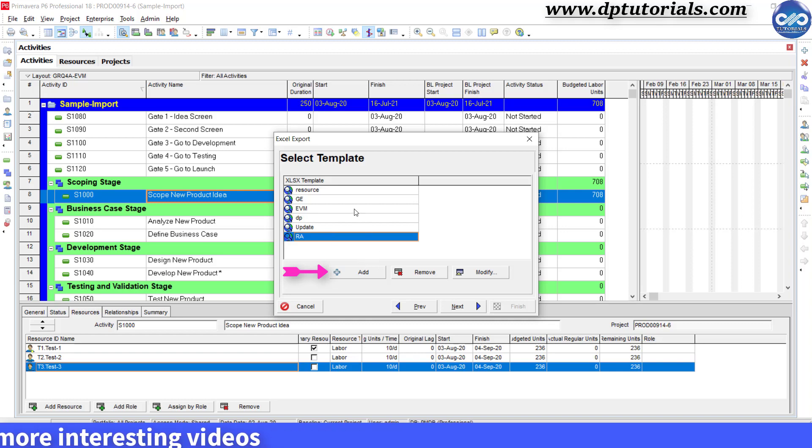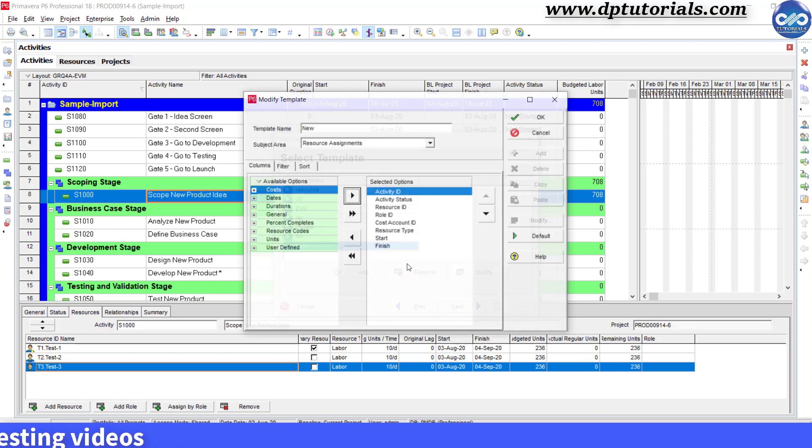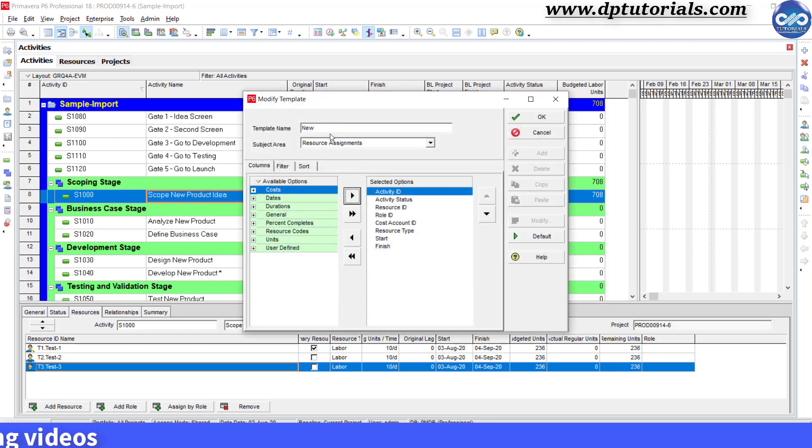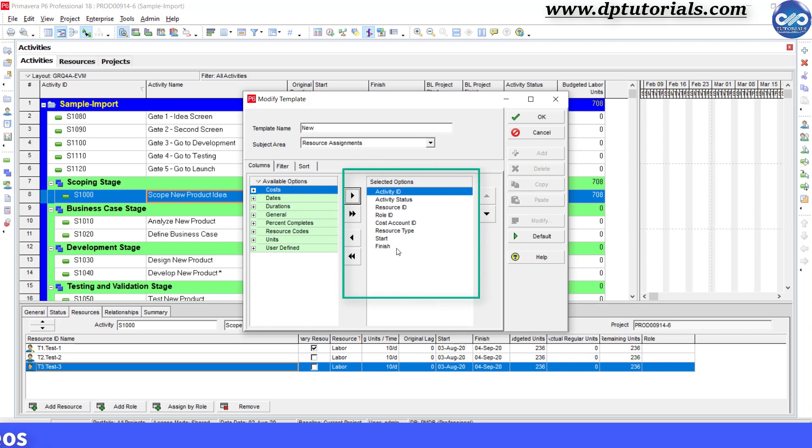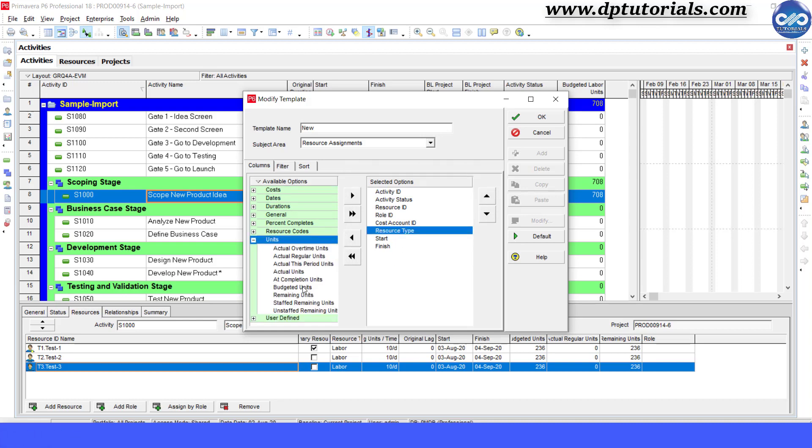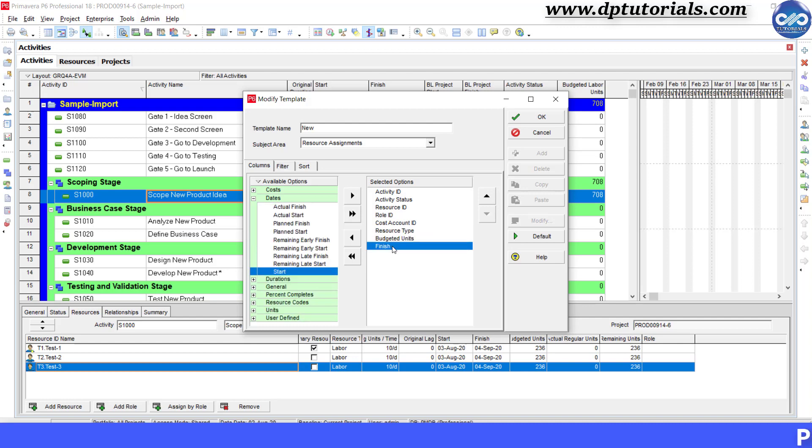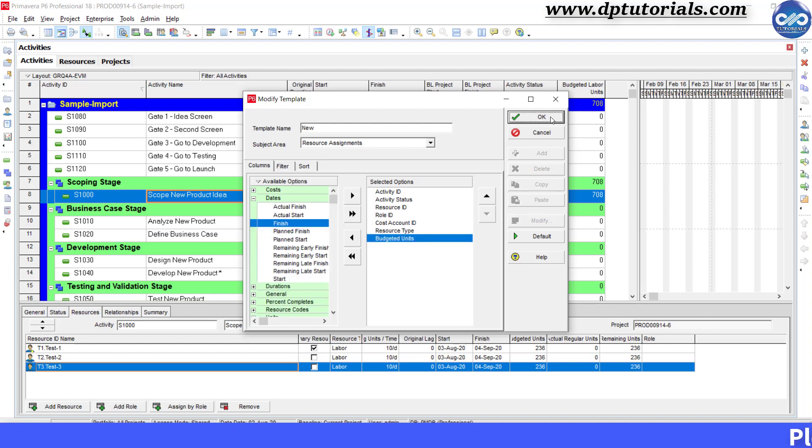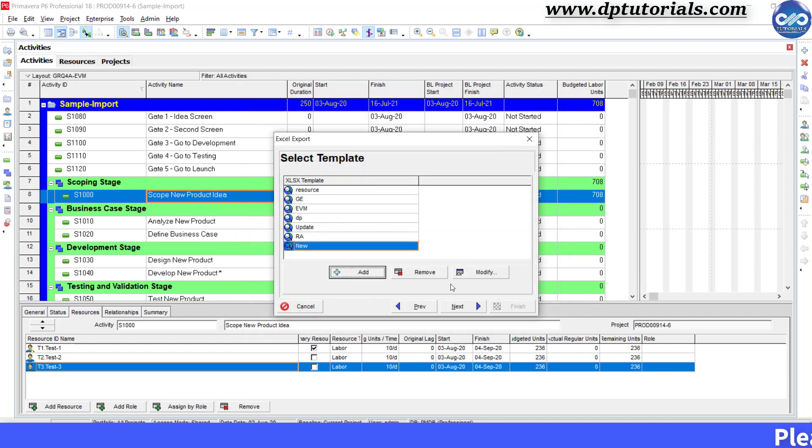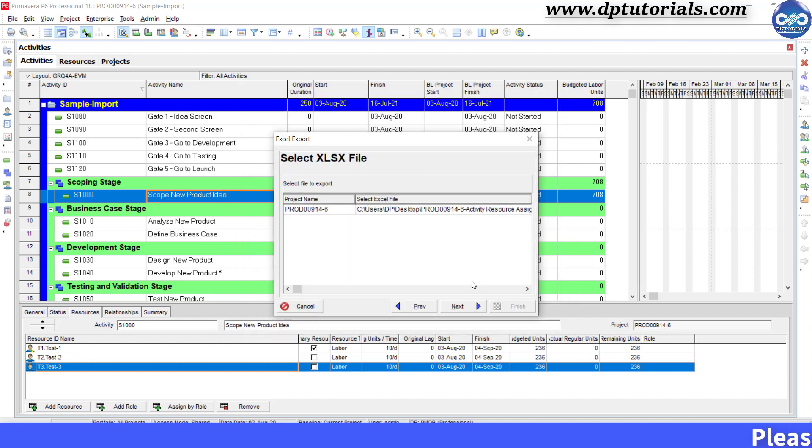In the Select Template dialog box, click on Add and add these following columns here. Apart from this, I am adding Budgeted units and will remove Start and Finish columns. And click OK. And click Next.